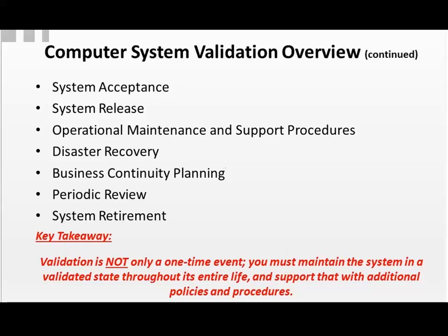You'll also have, it's not on this list, a validation summary report that indicates that everything you said you would do in your validation plan has been done and was successful, and you've met everything required. The summary report should be the last thing before you put your system into production.